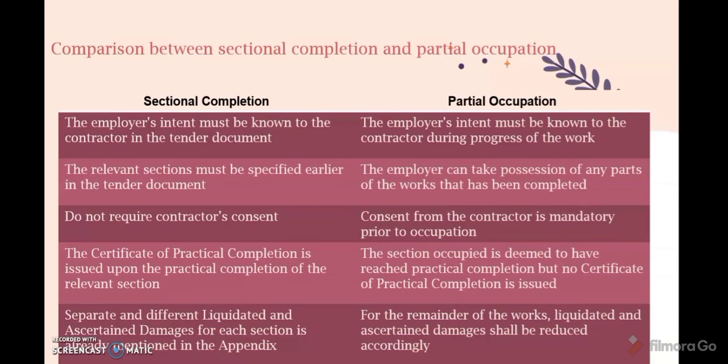The last point is that sectional completion has separate and different liquidated and ascertained damages for each section, already mentioned in the appendix. Meanwhile, for partial occupation, for the remainder of works, liquidated and ascertained damages shall be reduced accordingly.